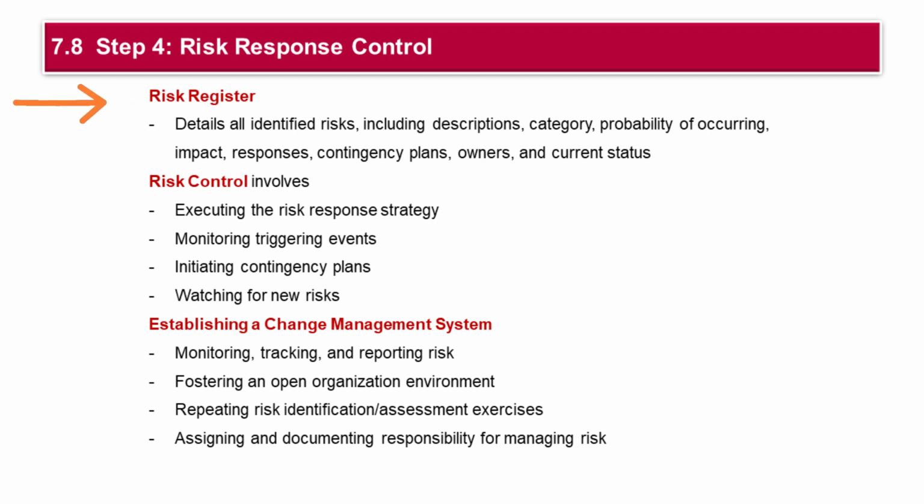This register details all identified risks, including descriptions, categories, probabilities, impacts, responses, contingency plans, owners, and current statuses. It serves as the foundation for risk control, which involves executing response strategies, monitoring triggering events, initiating contingency plans, and identifying new risks. Establishing a change management system to handle formal changes to scope, budget, or schedule is a crucial